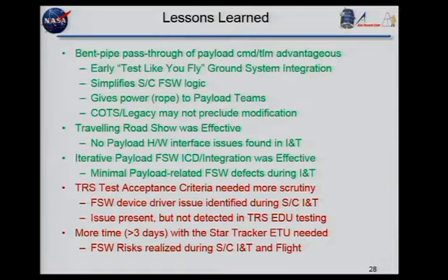Since this was our first flight software project, we didn't have a lot of credibility. We were like the rookie in the NBA who gets hacked and they never call a foul, but if you're Michael Jordan, they blow the whistle. So they said it's COTS and this interface can't change, and that's what we worked to. We didn't push back on different things, but it turned out one of the payload interfaces also flew on MAVEN. When I talked to him at the end of the mission, he said, "You guys are too nice. You didn't actually ask us to change anything."